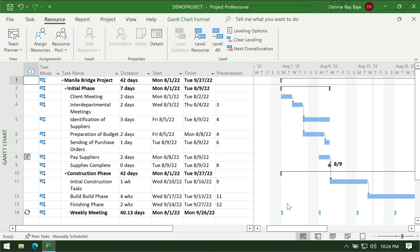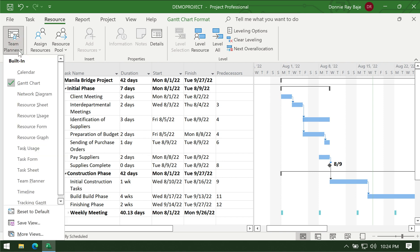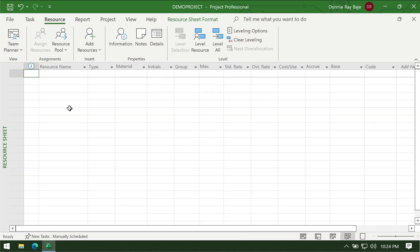The next thing that you are going to do is assign resources to the project. Resources pertain to either people, materials, or other costs associated with certain tasks. To start that process, you have to change your view into the resource sheet view.